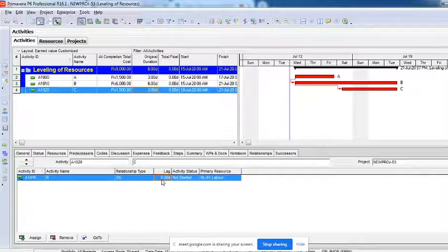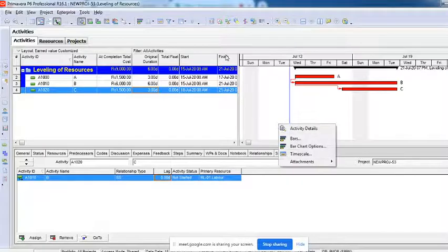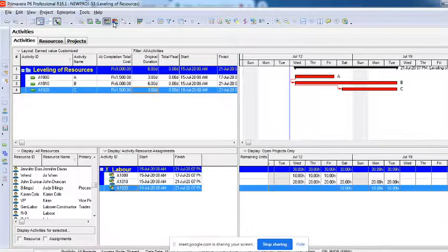We haven't given any lag in the relationship, but the activity has got rescheduled on those particular days. You can see here where it was 10, 10, 10 on Wednesday, Thursday, Friday, it has got shifted to Saturday, Monday, Tuesday automatically. I did not do it manually. I did not do any changes,